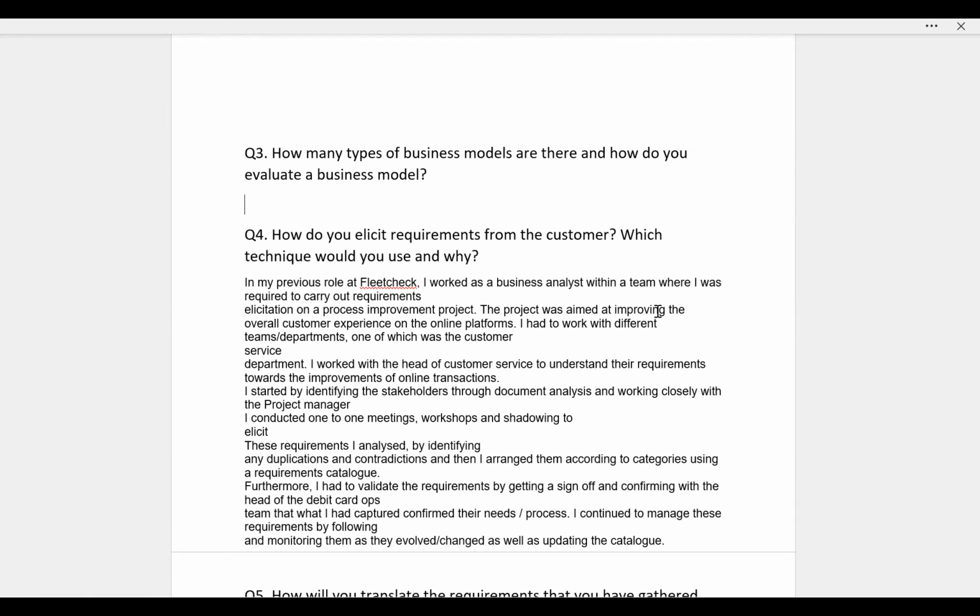That means customers have to do the payment first, and then the products will be delivered to their doorstep. So the cash on delivery option is out of scope. Under the payment section, or when they are trying to do the checkout, customers will not see the cash on delivery option. So your team is not going to put that feature over here. That is out of scope.